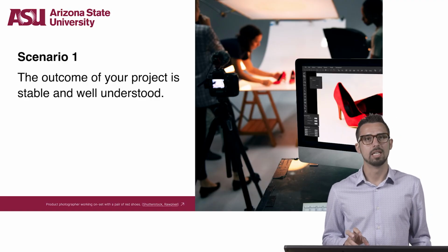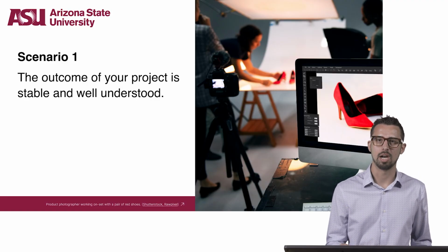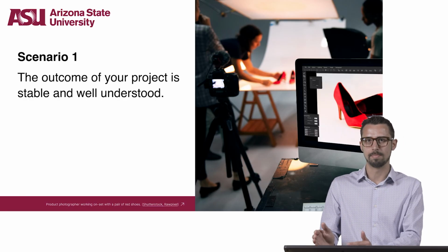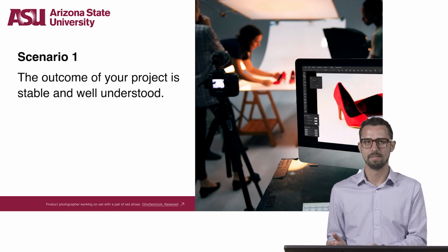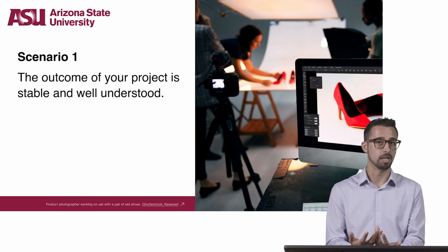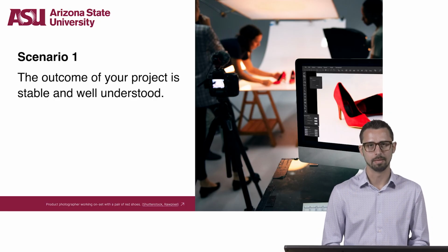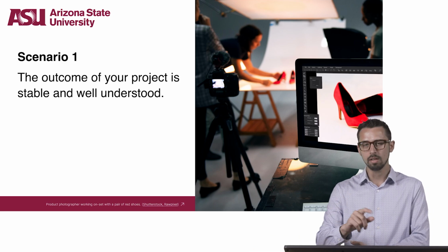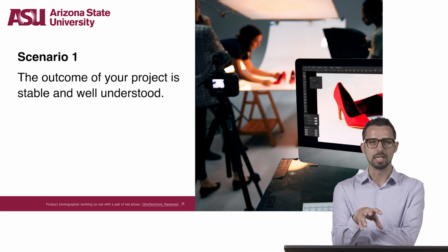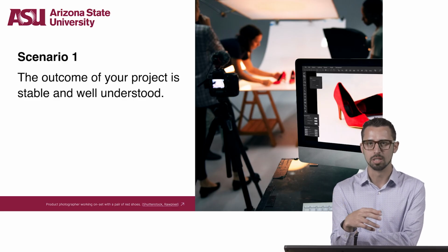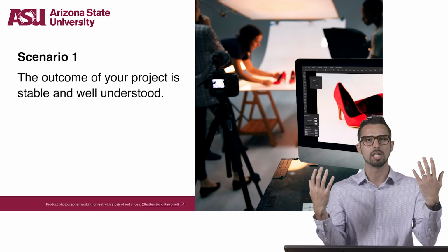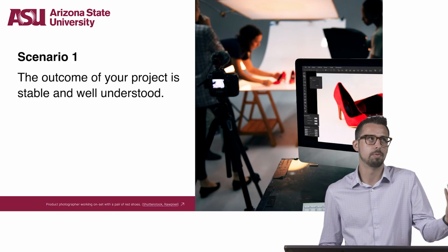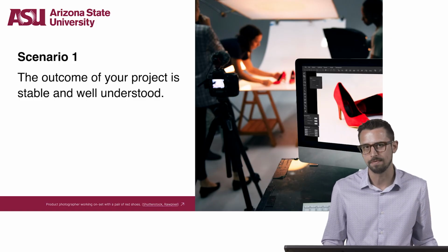Agile is intended to help reduce the cost of change and uncertainty on a project by breaking it down into iterative project management steps. However, if there's already very little uncertainty and a low possibility of change, Agile may not be the most effective approach. For instance, if you work in an industry with lots of regulations or where many of the project requirements are already known, if you don't need iterative planning and multiple drafts, then Agile might not be the right fit.